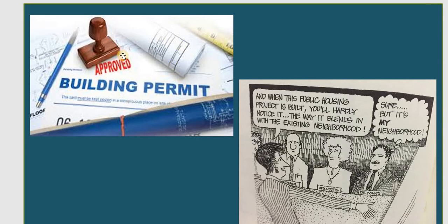So before you start to do something, you need to apply and you need to finish the drawing for everything, from design, the pre-design, and construction documents. After that you submit to the city. It takes maybe 1 month to get the approval. After you get approval or the permit, you can start construction.